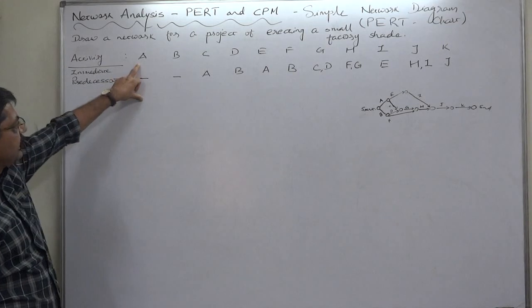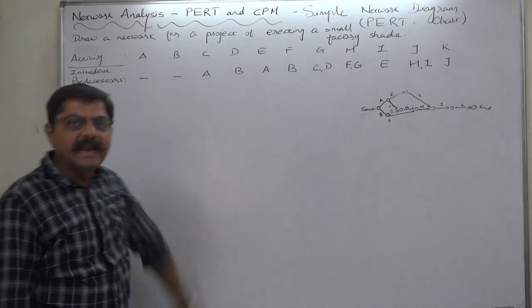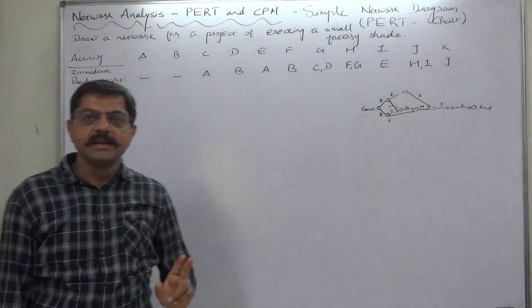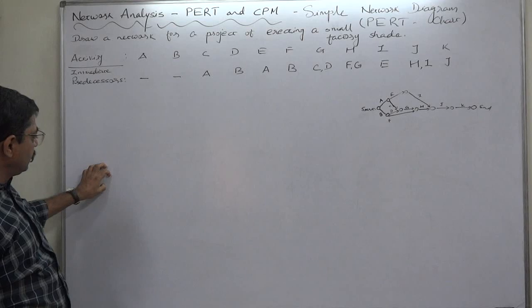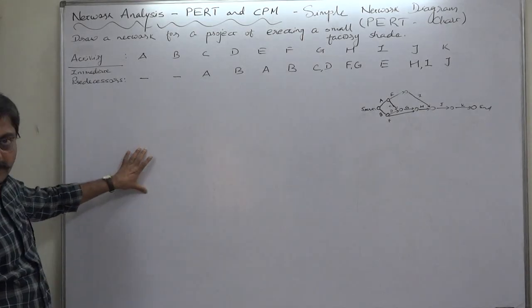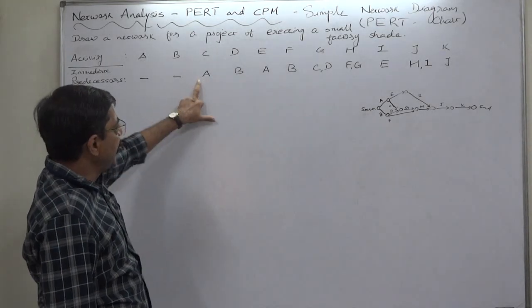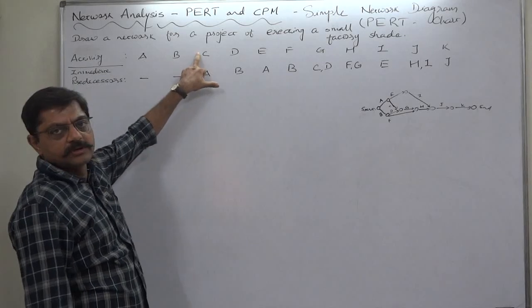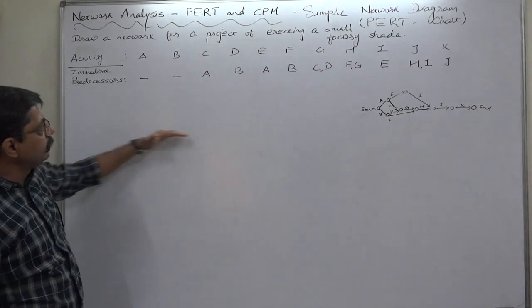Immediate predecessors: A has no predecessor, B has no predecessor. That means A and B both are initial activities—the start event is a burst event from where A as well as B both start. C follows A, meaning A is predecessor of C.